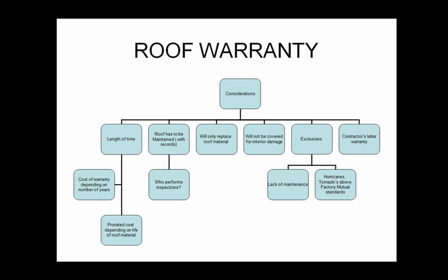All right, so sometimes there's a prorated way to get some of these systems warranted. Right. And basically it'll over time, because we know that the warranty has a finite limit, and we know eventually the material will corrode and you'll need to replace it. The cost for the warranty could be low at the beginning and go up as time goes on. I've also seen vice versa of that as well, where early on, after your couple of years of warranty, if you want to extend that, it'll cost more as the years go on.